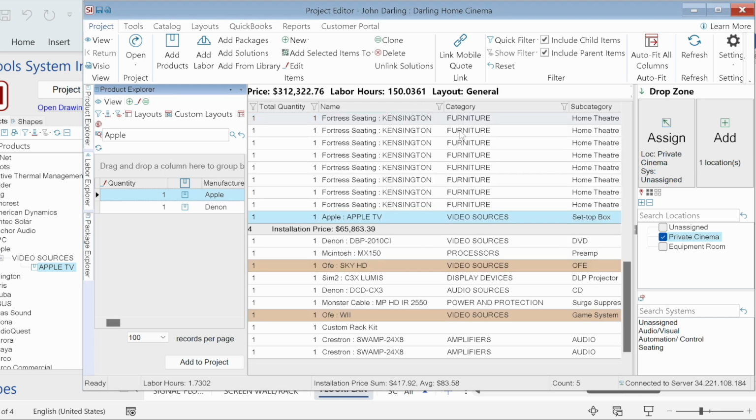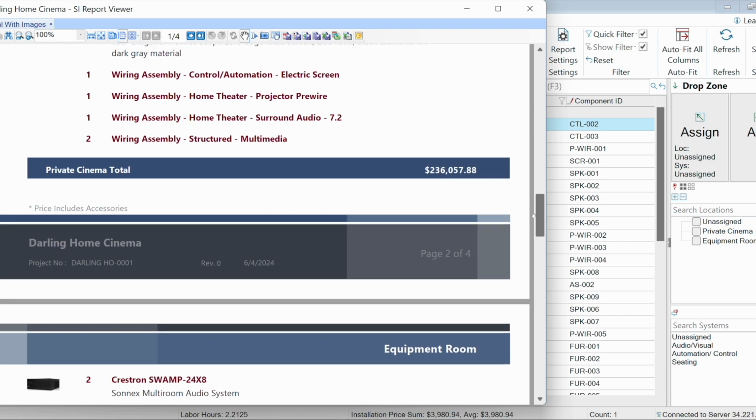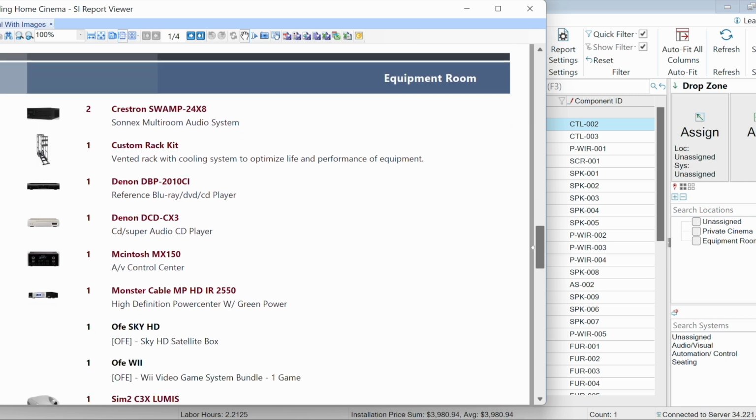So once the project has actually been sold and approved by the client, it goes into the design/change order phase, where we can really easily explain to the client, hey, if you want to make these changes, we can use D-Tools to explain just very simply in terms of numbers and in terms of equipment what that change actually will mean. I'm usually working with our D-Tools engineer to create proposals for clients or architects, and I work with our service manager as well to create larger service quotes, and we also work to create change orders for ongoing projects through D-Tools.